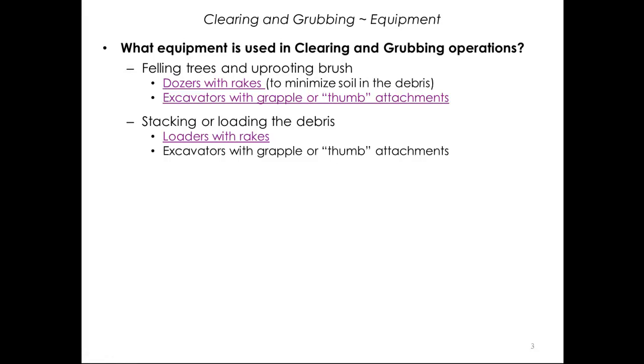Sometimes stumps have to be grubbed out separately. Both dozers and excavators are used for this operation. Roots that remain can require additional grubbing work, and depending on the amount, type, and depth, a number of options can be used. The most common practice is to use a wheel loader, which has good travel speed, with the rake pushed below the surface as it moves forward.